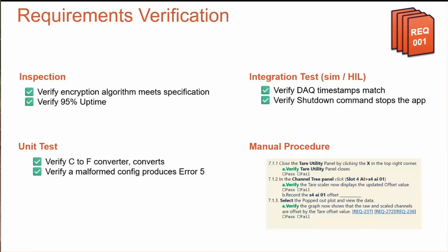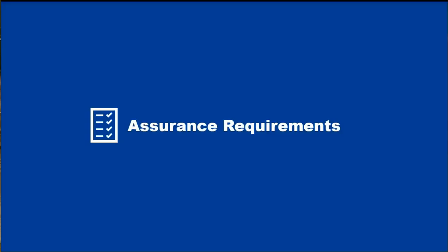A lot of them, especially if it involves user interfaces, you kind of need to write a manual test procedure. There are ways to automate UI testing, but it is very time consuming. And so, you know, you're constantly finding those balances. And then we present this, we nominate these to our customer and say, here's how we think we've proven this. And then they have to agree.